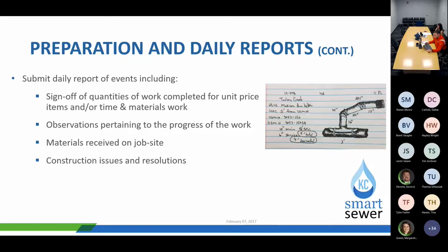If your daily report, actually also, when there is no work taking place due to the weather conditions, make a daily report of that. State on there, "Hey, contractor wasn't working at location due to weather conditions." Make a report of that. Again, those types of reports are the facts.